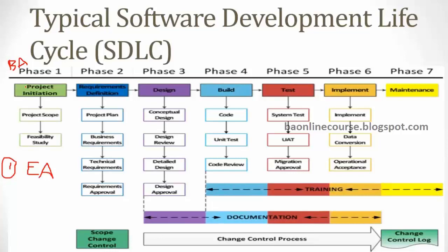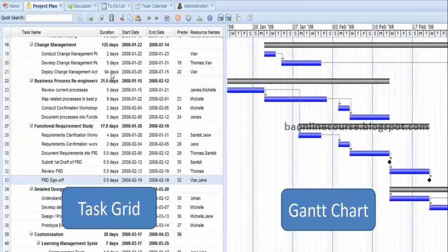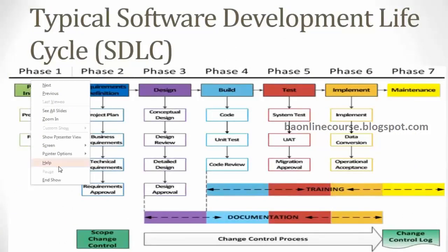Okay. So once the teams are onboarded, the first activity which is done is creation of the project plan. Now, who prepares the project plan? The project managers. Okay, the project managers would sit down, agree on the detailed activities, identify the estimates, timelines, and everything, and then create a comprehensive end-to-end plan, right from the requirements till it is implemented. They'll list down all the activities and who will work on those activities, right? So you'll have this task list, what are all the tasks, and then the duration, when it would start, when it would end, what are the dependency tasks, who are the people working on those tasks, right? The project managers would prepare this detailed list. Okay. Now that's the second activity that is done in the project.